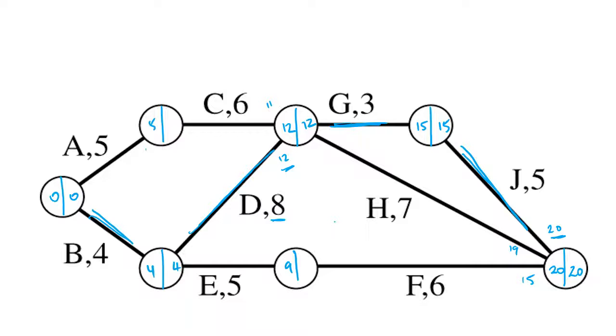That's our critical path. If we want to finish the rest of the network diagram, we can also consider float times. So 20 take 6 is 14. Now I've got a float time there of 14 take 9, which is 5 minutes.